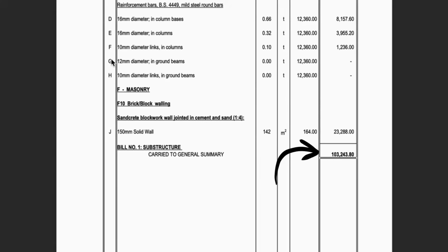Now I'll tell you the two things we added. I've mentioned that we insisted on having the ground beam being added. The second thing that we insisted on, and actually was highly recommended by our builder, was to make sure that the foundation level is a little higher, so that our place is elevated at least above what any potential street level or road level would be, so that our place does not become a receptor for water during rain and other things. That added an extra cost of about $2,000.